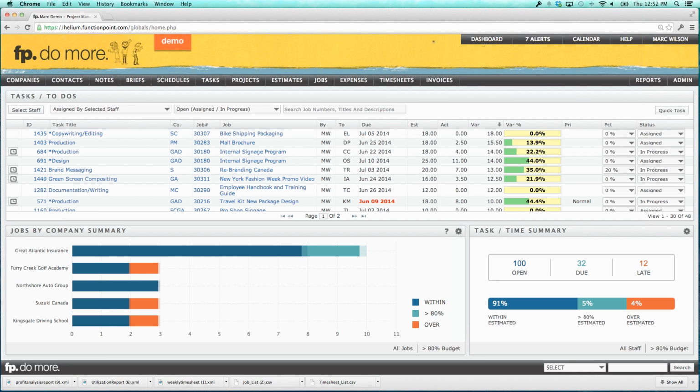Let's put their target in their work calendar that they work 50 hours a week, 55 hours a week. Because they're dedicated and they're wanting to do that. They're putting in that extra time. Let's look at the pattern and then adjust the work calendar to reflect that pattern, so we can get a more accurate profitability and adjust the cost rates around that as well.